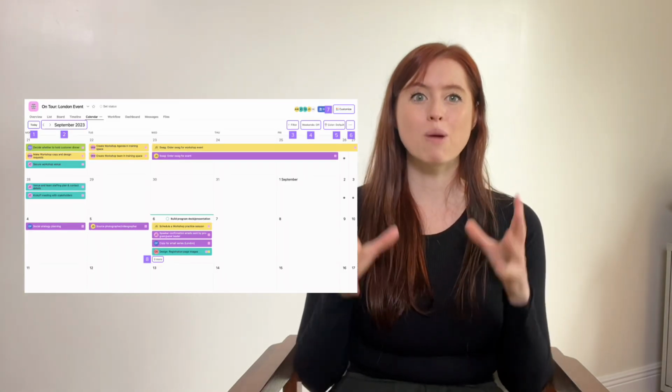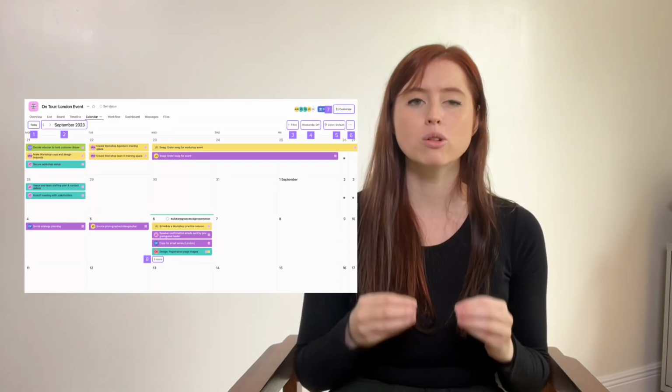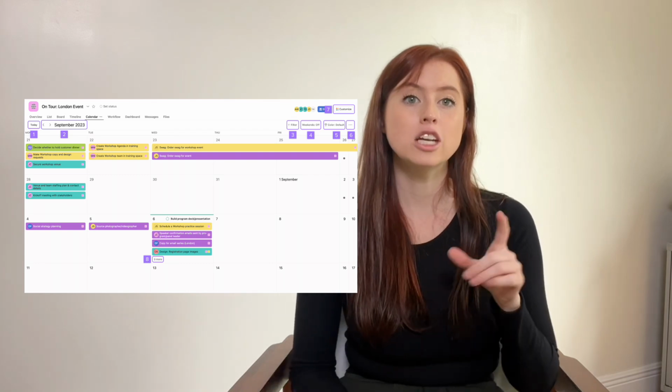Then in Asana, you're also going to want to have a project calendar. The project calendar is also going to be part of the morning check-in process, and it should only contain the big project due dates. They're going to want to cross-reference the board and make sure enough pieces of the board are being completed in time and assigned to the punch list in order to finalize the project. This should also be part of your assistant's daily task, so that they recognize when a project is getting close and they can either help you slow down and focus on quality, or speed up if necessary.